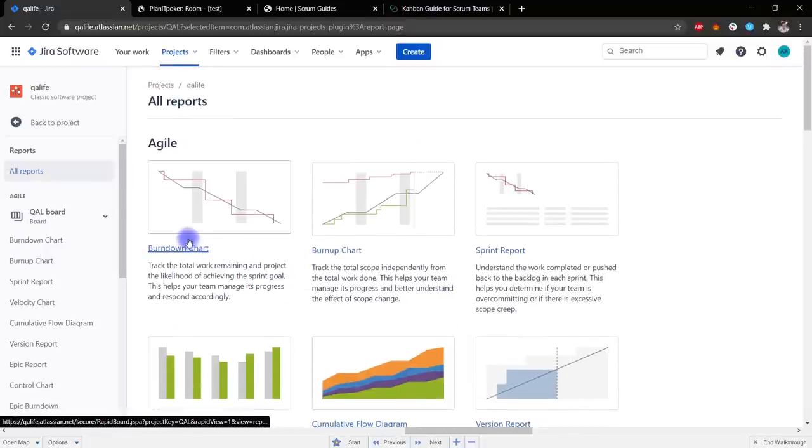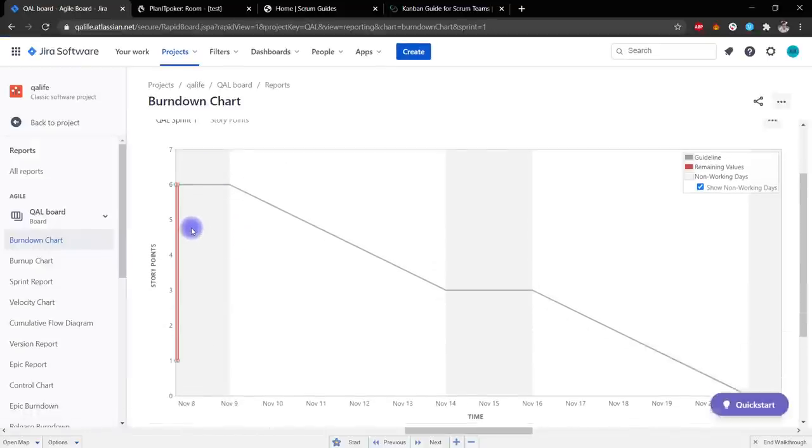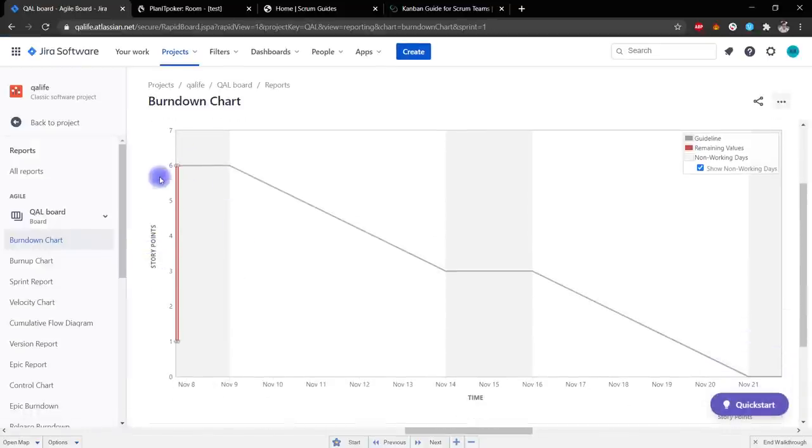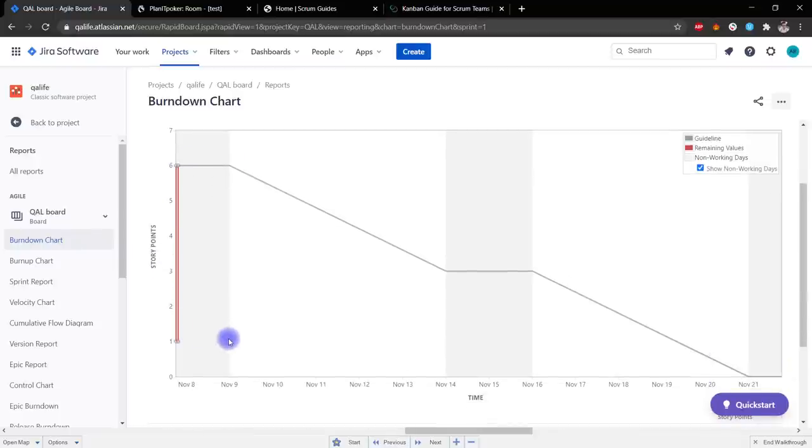If we talk about the burndown chart, then here we simply collect the number of story points that we take in our iteration. That is, for example, we have laid down 6 story points, that is, the sum of all story points in our user stories is 6. And we have, let's say, our ideal chart, how it should decrease, that is, we should gradually decrease the number of story points and take them to work so that everything would be smooth.